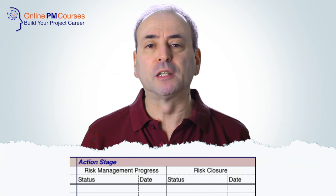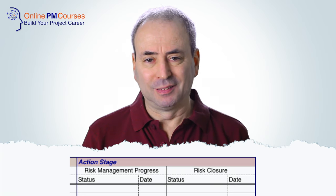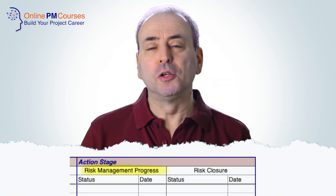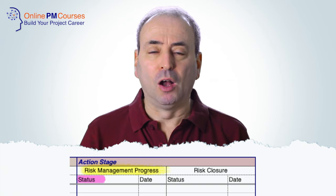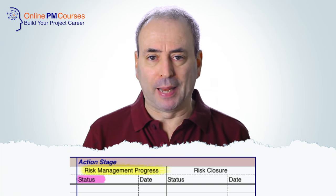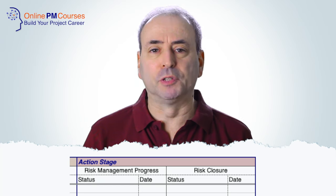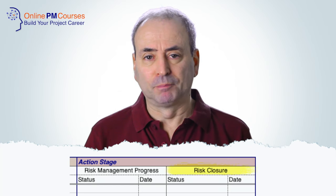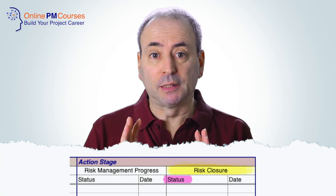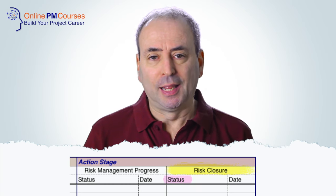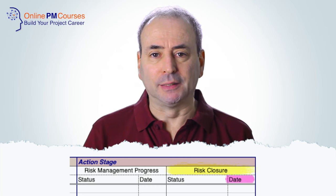The fourth part of your risk register is all about action. The first set of fields are about progress — a narrative field for status of that risk and progress on managing the plan, with a date against that status. Finally, I'd have a section for risk closure: what is the status? Has the risk gone away? Is it no longer a threat? Has it been managed out, or ceased to be a threat for natural reasons? Has it materialized and been dealt with? And the date at which it ceased to be a threat.